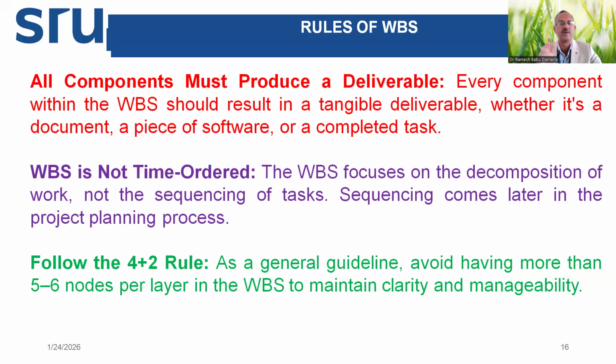It is not based on the time of project execution. It is only to understand which sub-assemblies are connected to which main assembly. So WBS focuses on decomposition of work, not the sequencing of tasks. The sequencing comes later in the project planning process, and we will learn sequencing in network analysis and scheduling.